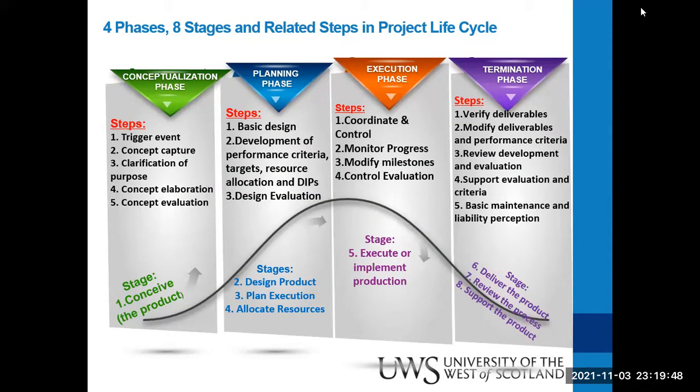So in this project life cycle, you see that the first phase, the conceptualization phase, has the first stage, which is to conceive the project or a service or the process, whichever we're doing. The steps normally involved are to trigger the event, start the event, capture the concept, whether in documented form or in a recorded version, okay, clarify what you are going to do, and also the concept must be elaborate enough for us to be able to understand. Comprehensive, okay, and at the end of the day, try to evaluate the concept to see whether it makes sense.